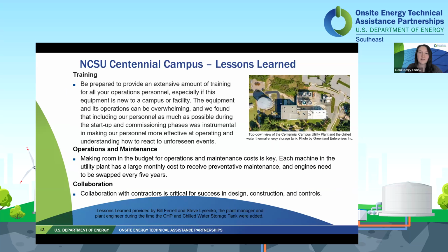All right, so as far as training goes, be prepared to provide an extensive amount of training for all of your operations personnel, especially if this equipment is new to campus or a facility. The equipment and its operations can be overwhelming, and we found that including our personnel as much as possible during the startup and commissioning phases was really helpful to help the personnel be more effective at operating and understanding how to react to unforeseen events.